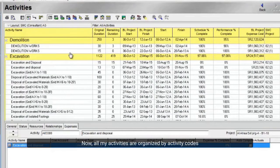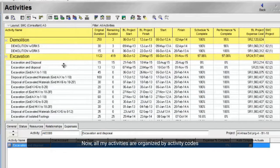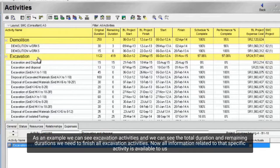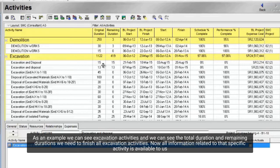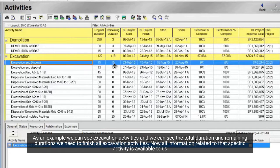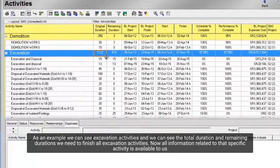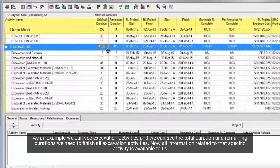Now, all my activities are organized by activity codes. As an example, we can see excavation activities, and we can see the total duration and remaining durations we need to finish all excavation activities. Now all information related to that specific activity is available to us.